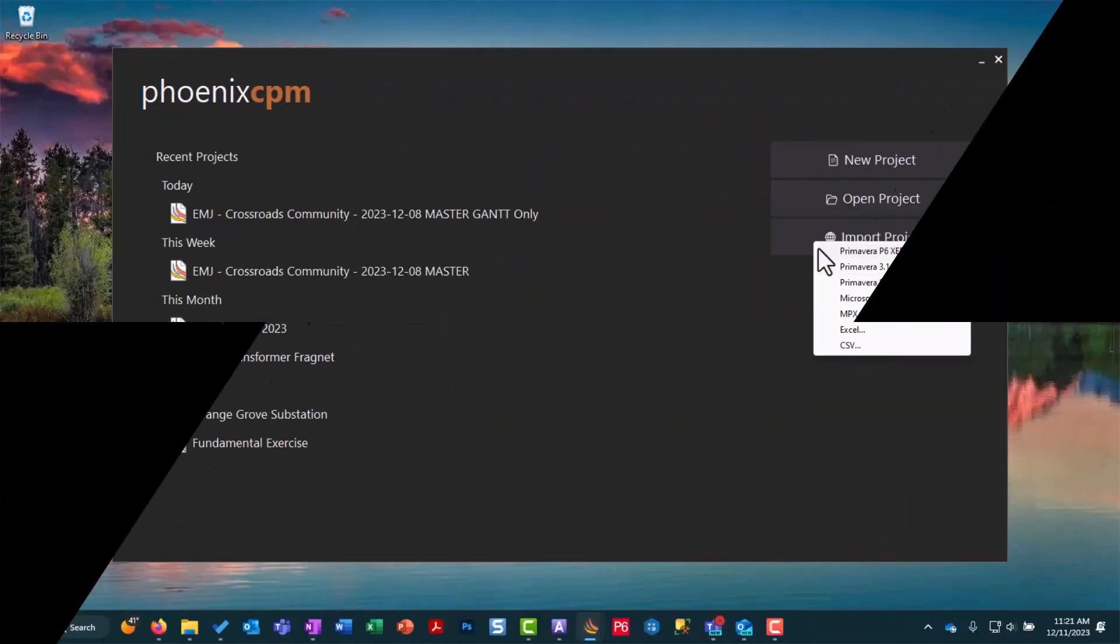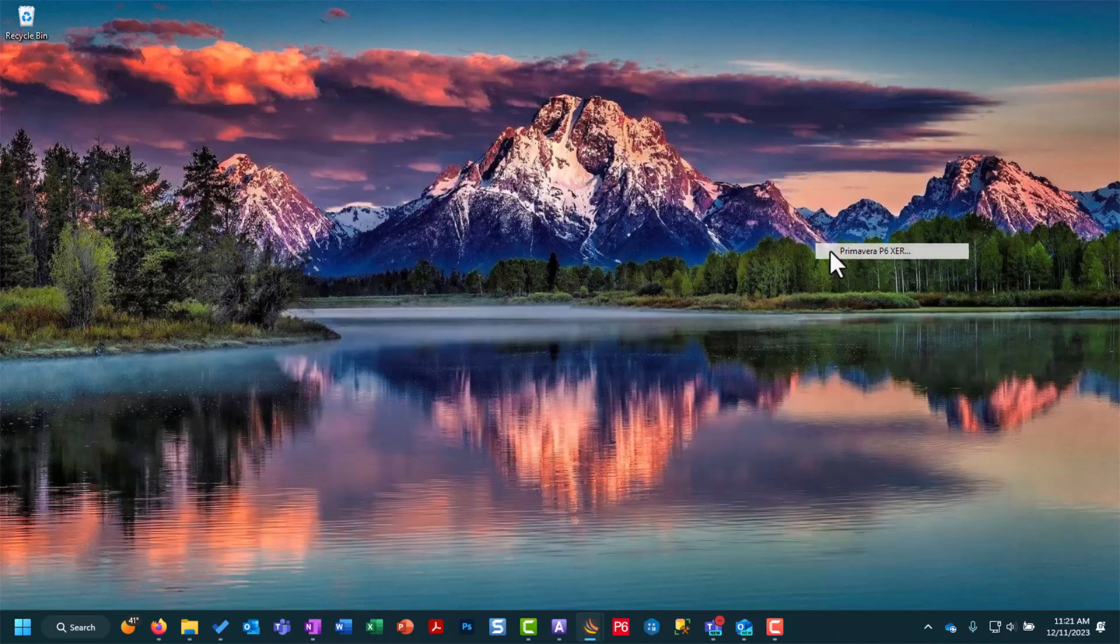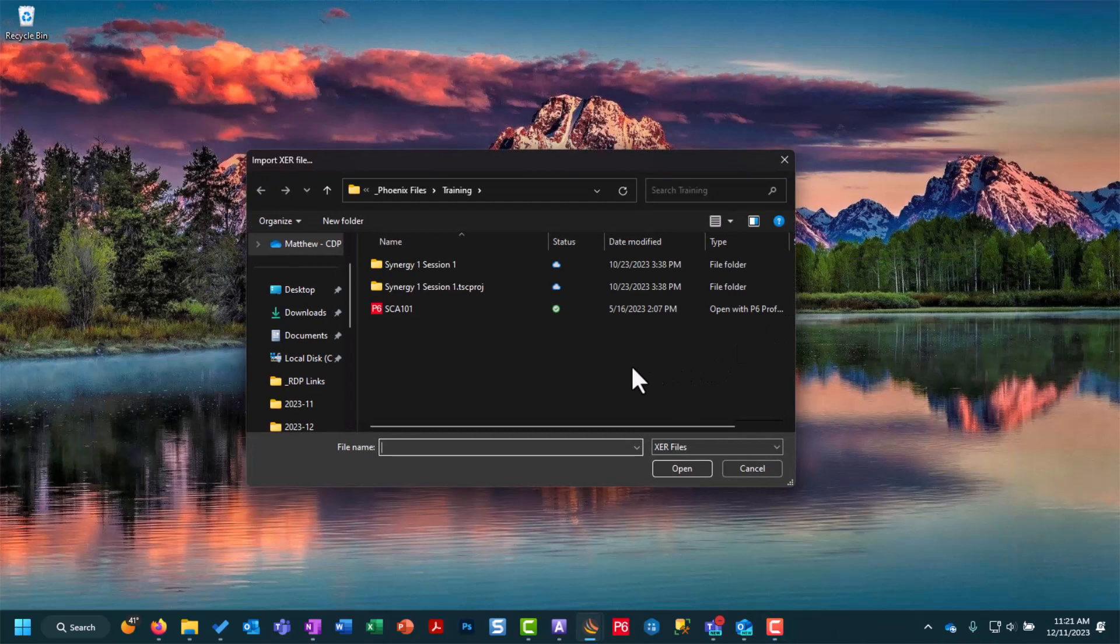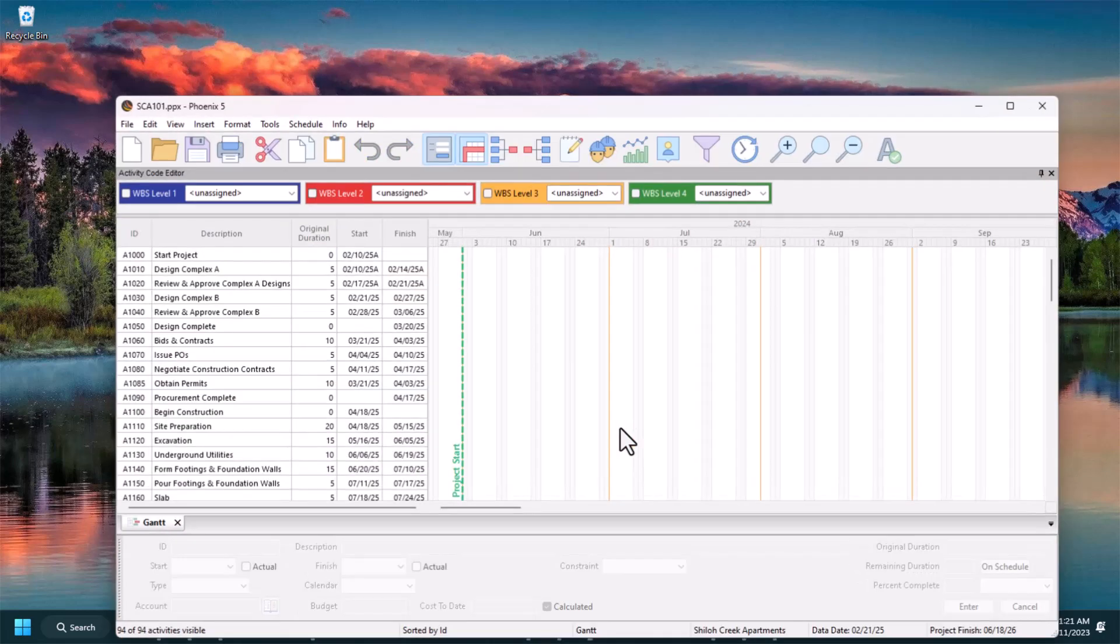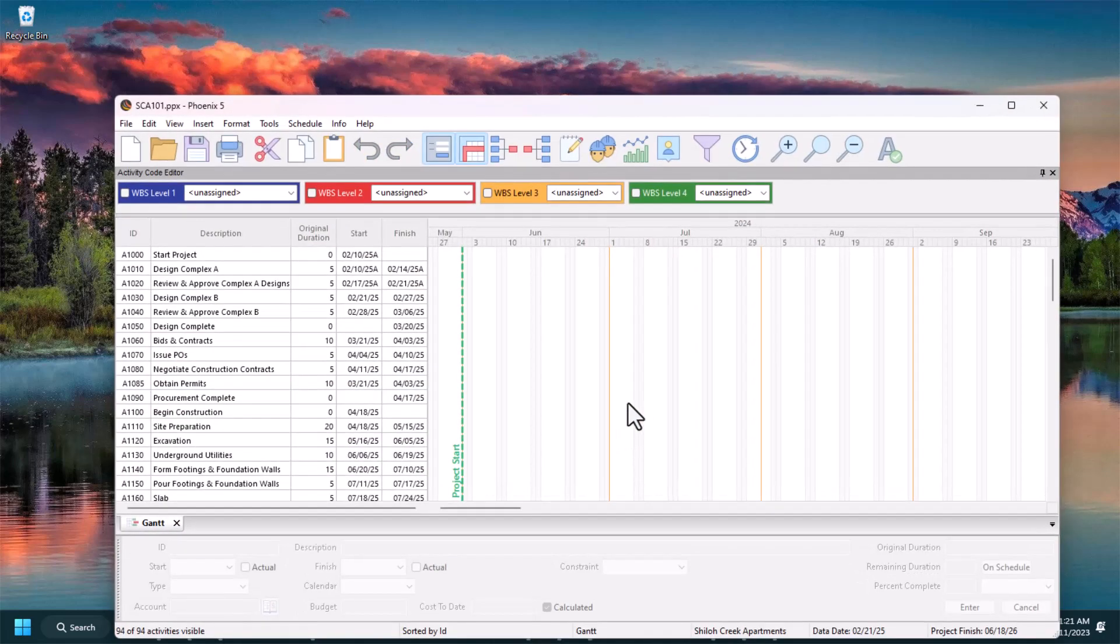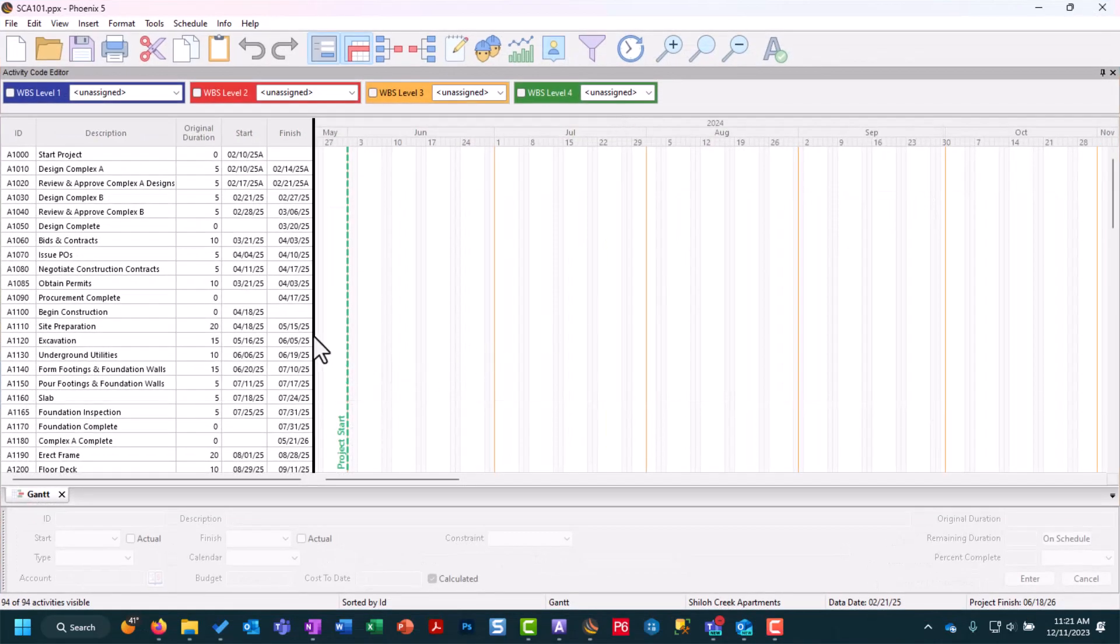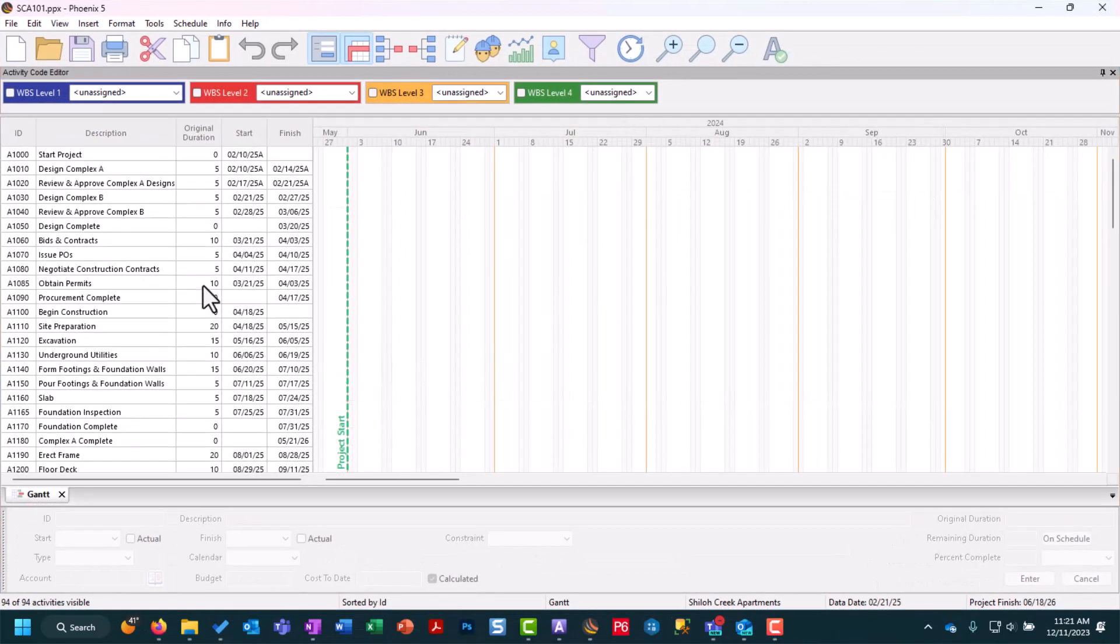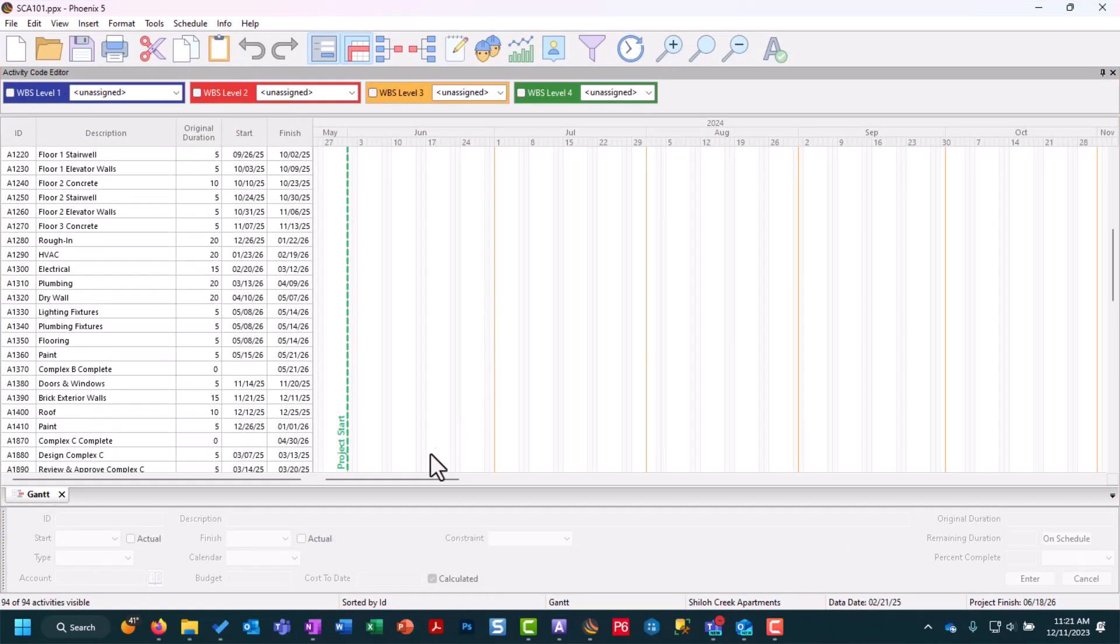Our first import option we're going to look at is the Primavera XER format. If we select that in the import project dialog box we'll be taken to our Windows folder structure where we can choose our P6 XER file, open it. Phoenix is going to load and open that project now imported with our list of activities on the left, our Gantt chart on the right.